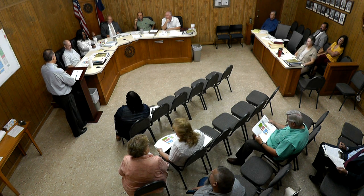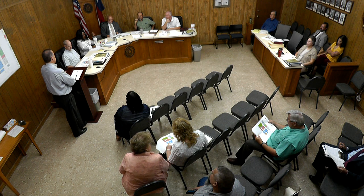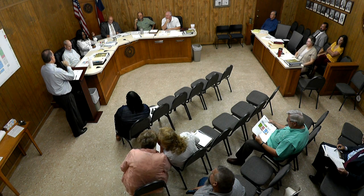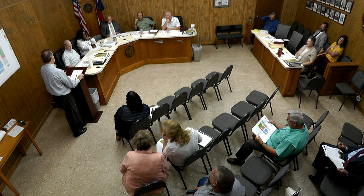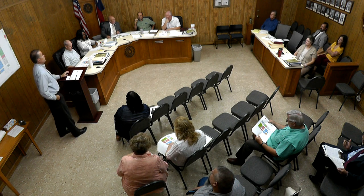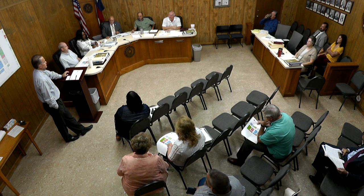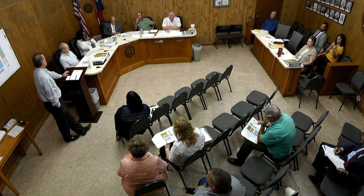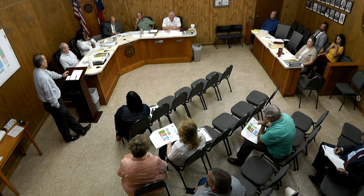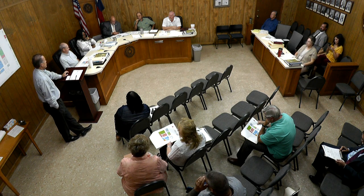If you remember, there was a bad hailstorm in the College Station area several years ago, and now that hail zone has dipped down. I don't think it's quite here, but we might look at upping the roof quality to make sure it's hail resistant. There was a bad one this spring. Well, I'm having my roof replaced within the next few weeks because of the hail. We got hail. Yeah. So that's something in this region that we're monitoring, to get the right spec. I've got a roof at A&M I'm speccing that's going to have the hail resistant FM Global criteria for hail resistance.